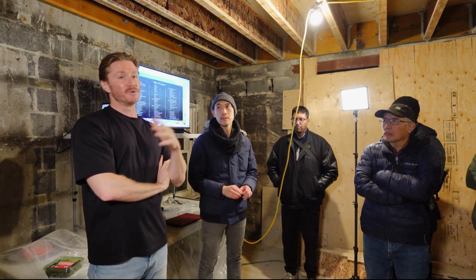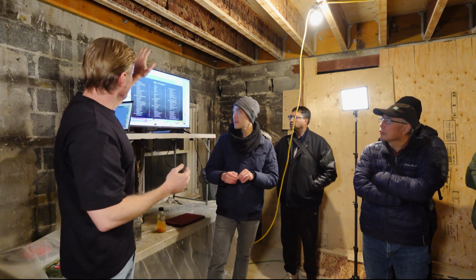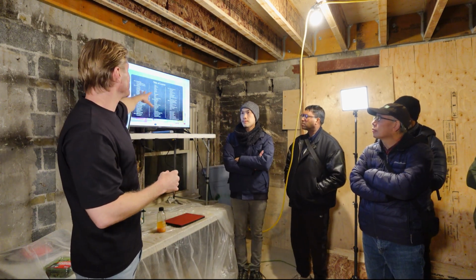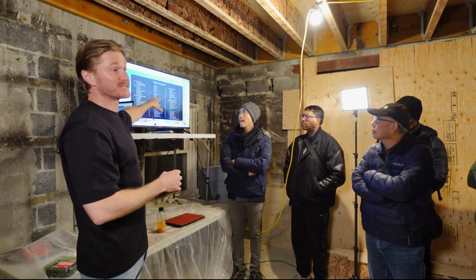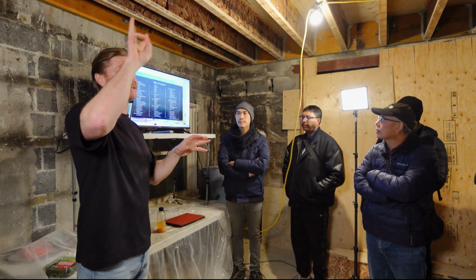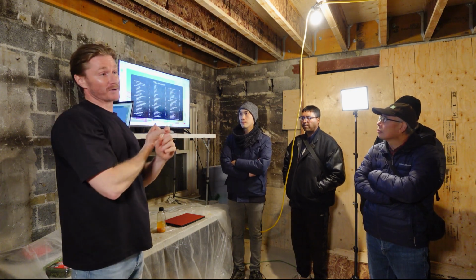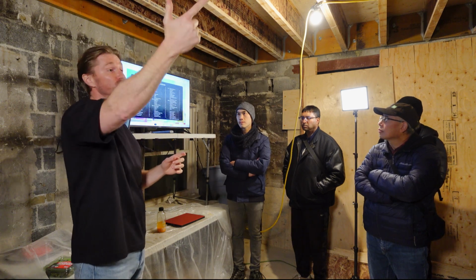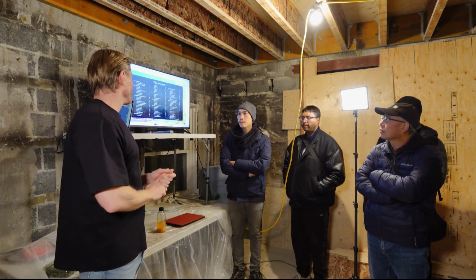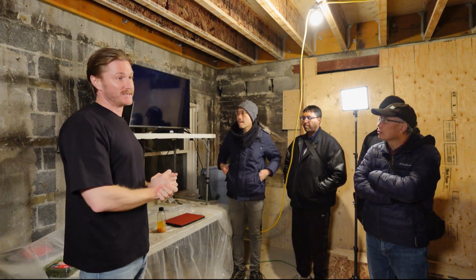I kind of have a bit of a blueprint that I can share. So here's again how I think I can help people in this room. We put this together not because we wanted to sell it and not because we wanted to give it away to people. We put this together because the banks were asking us to put this together for our clients. If you want CMHC construction financing or permanent financing, you need 3 documents. The first, you need an energy model report, and I can help you with that. The second, you need a construction budget. I'd be happy to share mine with you. The third, you need a pro forma. You need some kind of rental analysis. With those 3 documents, you can submit to CMHC.